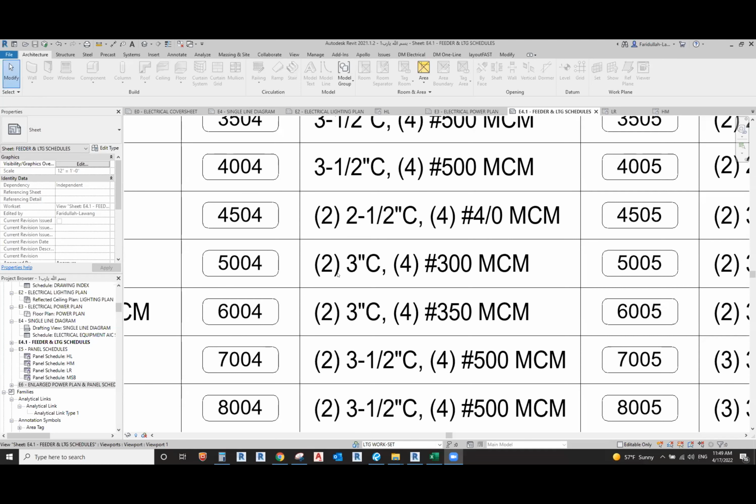And also you should consider in your cost estimation the conduit size. So you have two 3-inch conduits. At the same time, if you want to know what's the length, you have to refer here, like it's 70 feet. So you have to buy 150. So you see here 154. So you go here. Actually, I cannot see the screen. Sorry. Yes, now I can see.